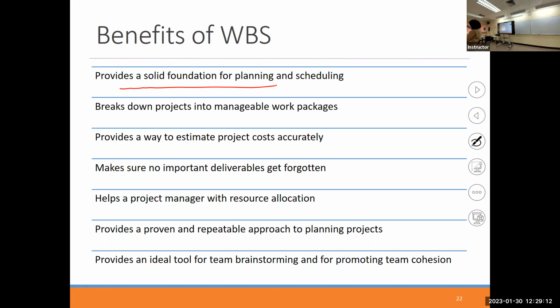Why? Here, let's look at the work breakdown. These are all the works we have to do. With this, you can firmly negotiate the scheduling. Otherwise, it's just a feeling that you can do it in 6 months, and in my feeling I need 9 or 10 months. No, you need evidence and a proper way to explain and justify your scheduling.